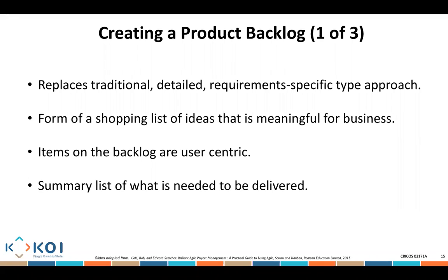The backlog is, if you want, replacing the traditional way of creating detailed requirements at the beginning of the project. That doesn't mean we are not going to understand requirements. We do understand requirements, but we start planning how we do things in more detail after we choose which requirement or which user story we are going to be working on. So initially, the user story would be very high level. After we pick up that user story and start working on it, we'll be able to get much more details to get the job done.